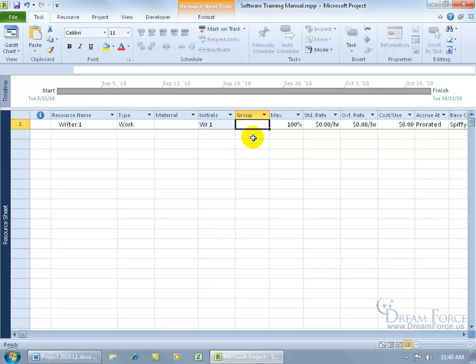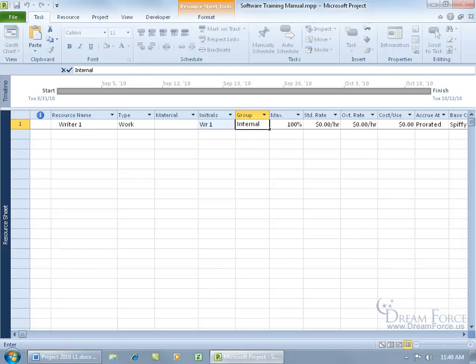Then you've got the group, which will contain the name of the group the resource is assigned to. Now you don't have to assign your resource to a group. Just go ahead and type it in. I'm going to have internal resources, so I'll type internal. And then if a resource is external, like we're going to be having some of the tasks outsourced to people outside of the company, then I'll go ahead and add the label field in the group field for them as external.